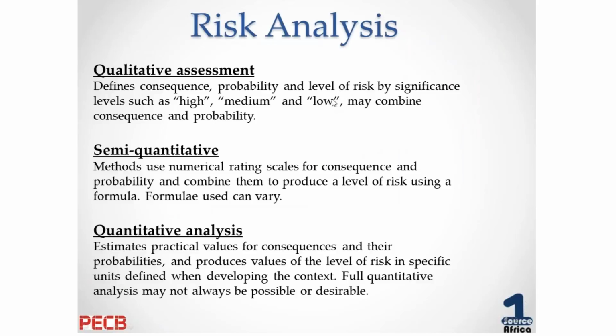Risk analysis can be split into a number of different assessments, and the one that we always utilize as risk professionals in all probability is the qualitative assessment. This is really to try and get it on a matrix of sorts, a high, medium, low type of approach. It's a combination of your consequence and probability, and in most cases it is a product of the two, consequence times probability, and it gives us a rating. We normally put some colors to it as well, just to highlight the acceptability of the risk.